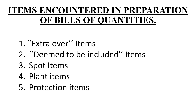Have you ever been looking at a bill of quantity and saw things labeled items, especially in takeoff? In a bill of quantity, we allow a sum of money for some things — we do not measure them as individual items, we just allow a sum of money. For example, we allow $50,000 for the watering of the site. These are things that have not been measured specifically, because we cannot measure them from the drawings. Remember, when you are doing the tendering process, what is provided is the drawings, the specifications, and their documents. Some things you have to be on site to measure accurately how much it will cost. But because we have to tender, we allow some money to cater for those items, which is provisional, meaning that it can change when we go to site.